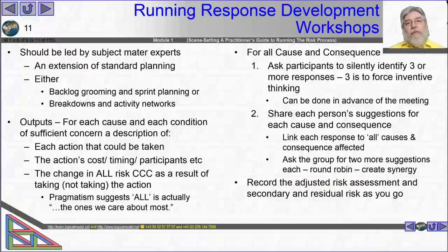It was very concerning before we thought of the action. Now we've thought of this action. If we take the action successfully, it's not so concerning. So this is recording a reassessment, and there are 2 dimensions we'll talk about in a lot more detail later, which is secondary risk. That is, say, risks created by taking the action.